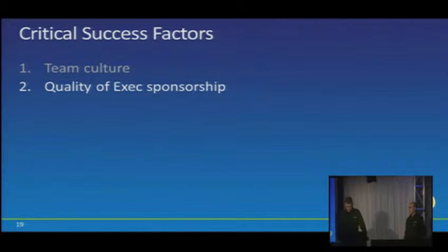And yet, what's also interesting is we are the eternally optimistic developers that let them off the hook from the start. It's a very subtle thing. If your sponsor only has peripheral involvement in the project, this is an early warning sign of likely failure. Get them more involved or run away and find another project.